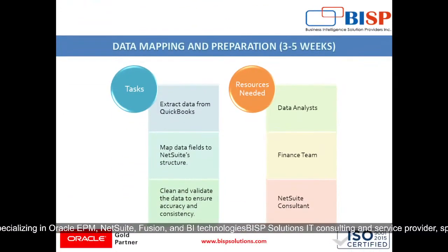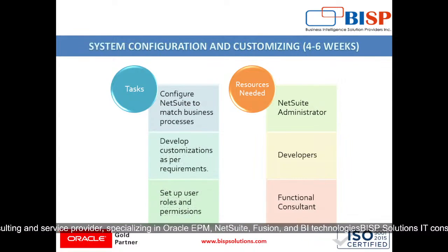Then data mapping and preparation, which will take around 3 to 5 weeks, where tasks involved are extracting data from QuickBooks and mapping data fields to NetSuite structure, and then cleaning and validating the data to ensure accuracy and consistency, where resources needed are data analysts, finance team, and NetSuite consultants.